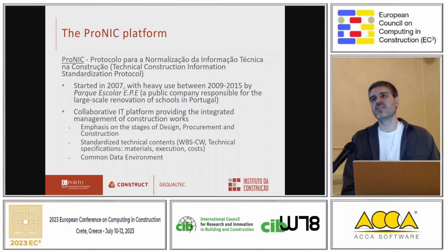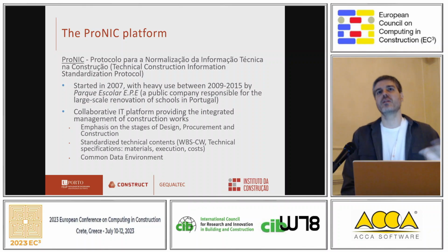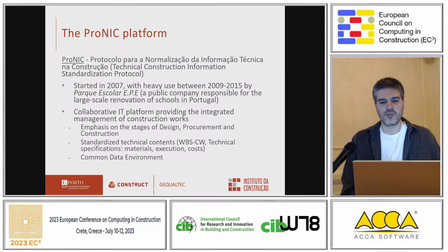And there's going to be some details about the Portuguese view on what the Bill of Quantities should be. But I guess I can basically summarize it as the Portuguese government mandates a certain detail on the Bill of Quantities. It's not enough to just kind of list the materials. You have to, in a short way, explain what the construction work entails. So you're actually building a wall, not just bricks and add some cement and water. So it's a little bit more detailed than perhaps some of you are accustomed when you hear Bill of Contents.